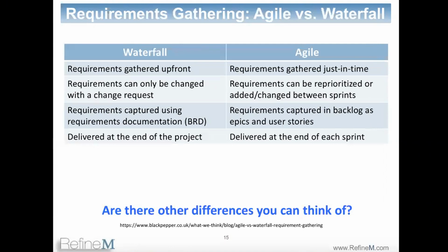Okay, scope creep. Very good observation about the scope creep here. So I want to tell you, Liz, there is nothing like scope creep in Agile projects, because you don't have fixed scope. Scope is the one thing that's variable in Agile projects.